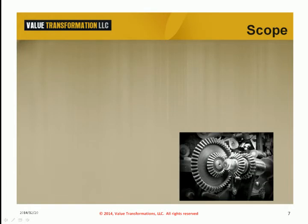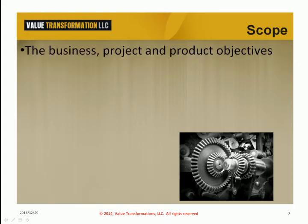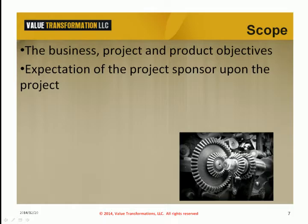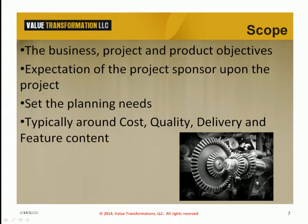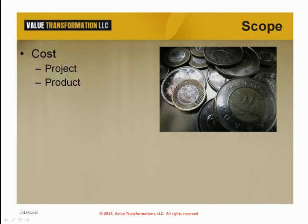The scope of the project is a result of these sundry areas of expertise. The scope documents business objectives, product objectives, costs, and quality targets. Ultimately, these will end up generating requirements and constraints for the product, if all goes according to the process from which the product will be formally developed. Requirements are the functional and technical details of the product. Constraints will be the things likely expected: quality, cost for the product and the development, and the expected delivery date. When we consider cost, there is the cost to design, test, and deliver the product to manufacturing — a function of the project — and the cost of the product alone, generally calculated from three components: factory overhead, labor, and materials.